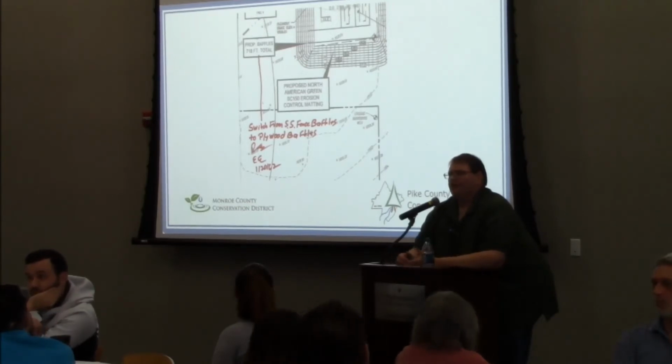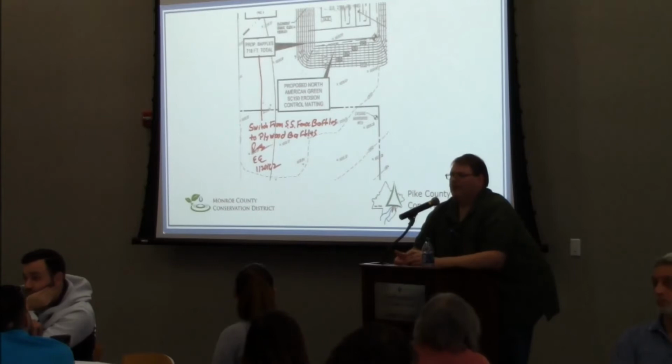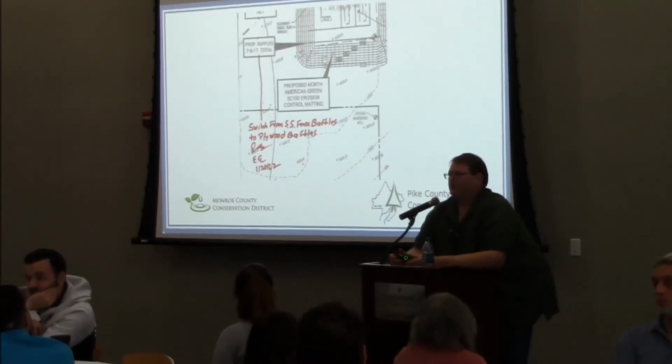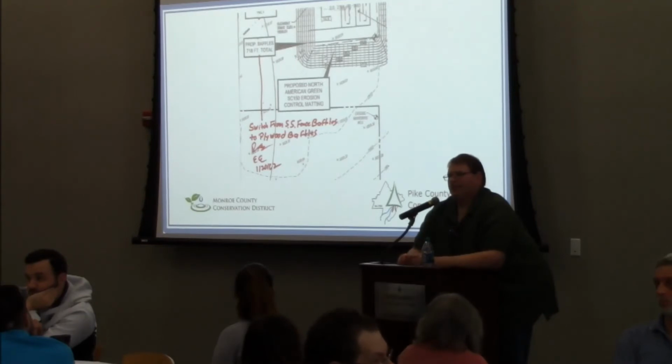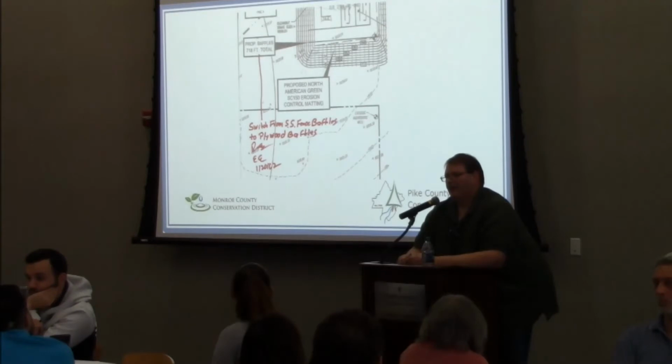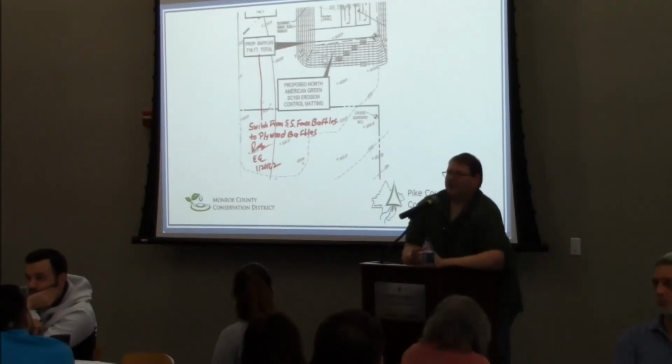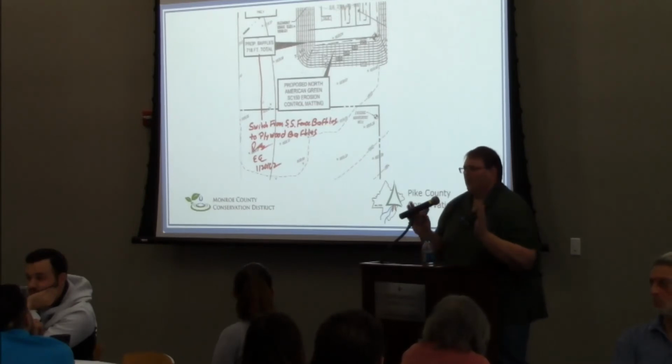So here we go. We have a super silt fence baffle, and they want to switch it over to a plywood baffle. Pretty simple change. I see this happen a lot where you have super silt fence baffles in the field, and it's a sediment basin that's going to be installed for multiple seasons. And anybody who knows the weather up here, the super silt fence baffles are good for about one winter. And then after that, they're toast.